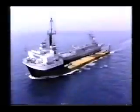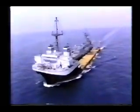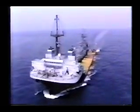Sunset, but the deballasting operation continues. Slowly, the frigate rises out of the water. By midnight, deballasting is complete. The Mighty Servant returns to Dubai with its cargo. Here, high-strength sea fastenings will be attached to secure the keel of the frigate.